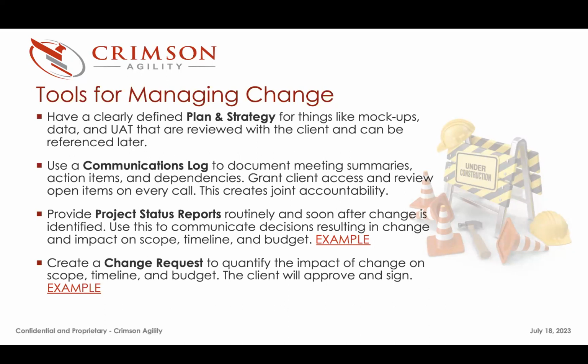Don't get defensive. Ultimately it's part of the project, and the best thing you can do is start managing change early. If you set the expectation that it's going to be managed and that you're paying attention, you're watching the dials, they will decide not to do things. They will decide to do things, and they'll bite the bullet and sign the change request. But if you don't manage it, and then all of a sudden at the end of the project you're trying to recover hours, that's when you get into trouble.